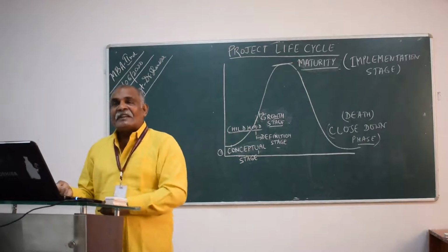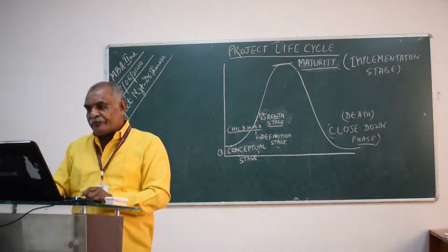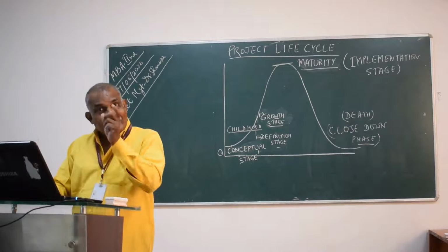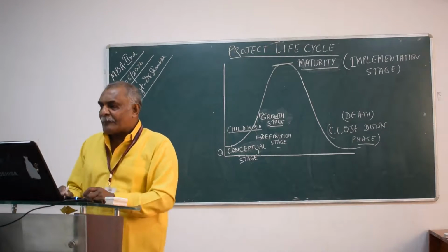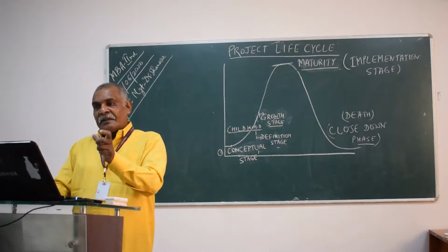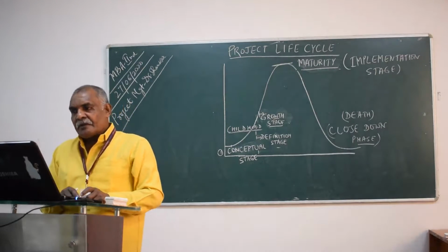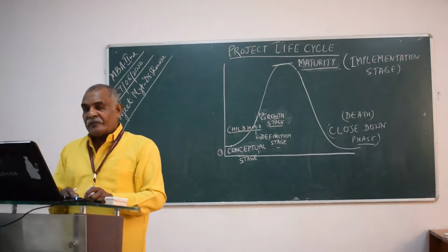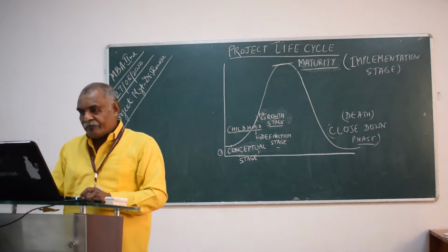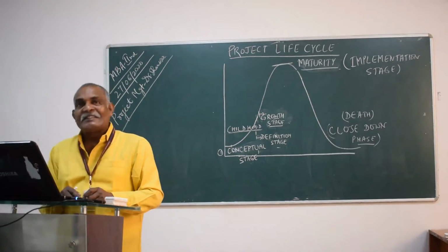This gives the details to be covered and documented, which will include the raw materials, quality and quantitative evaluation of each of the raw materials, plant capacity, that is description of the plant capacity, plant requirement and their capacity for each of the departments as well as the entire plant, locations and sites, technology, that is description of the selected technology and the reasons as to why this particular technology is selected. Project outlay, that is the optimum layout supported by drawing and giving reasons for the same.